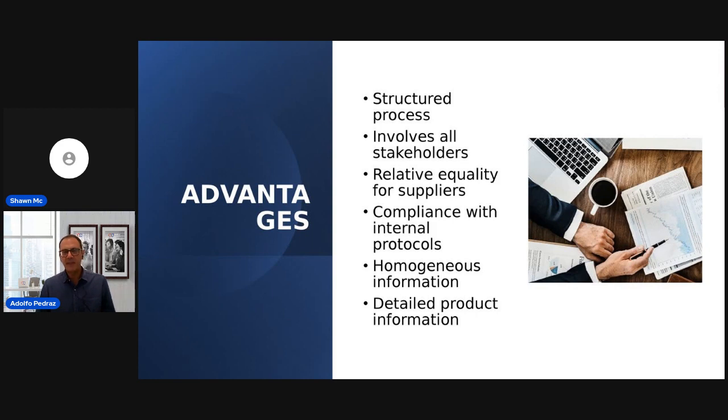Together with the equality for suppliers, there's a very important one, which is the compliance with the internal protocols for the company that is pushing the RFP. These internal protocols are basically that some companies have a policy to have at least 3 proposals when they are buying a new tool.